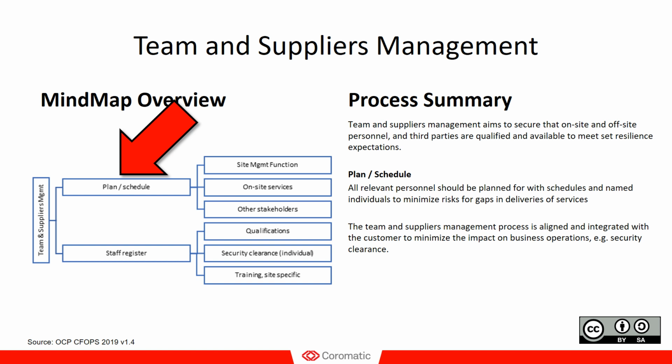Another one is that across the European Union there is a common regulatory requirement for the power distribution to be audited by independent experts every 10 years, and they provide a report that then is shared with the relevant authorities. So these kind of other stakeholders need to be planned for and given room for, even though you might not be able to schedule them exactly.